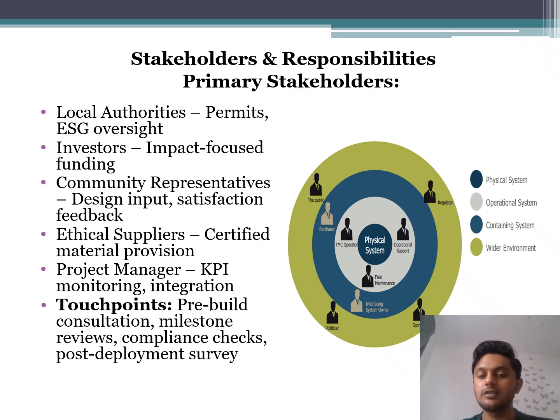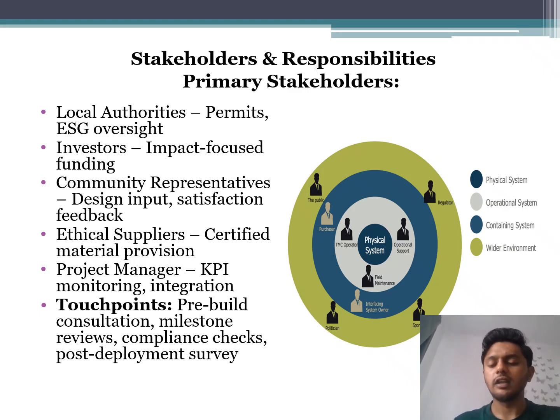And I'm gonna mention 4 to 5 touch points in this project: pre-build consultations, milestone reviews, compliance checks, and post-deployment surveys. As I told, we will do the surveys and take feedback, and we will check our compliance and supplies, and the milestone reviews, as we think about whether we are achieving the milestones or not.